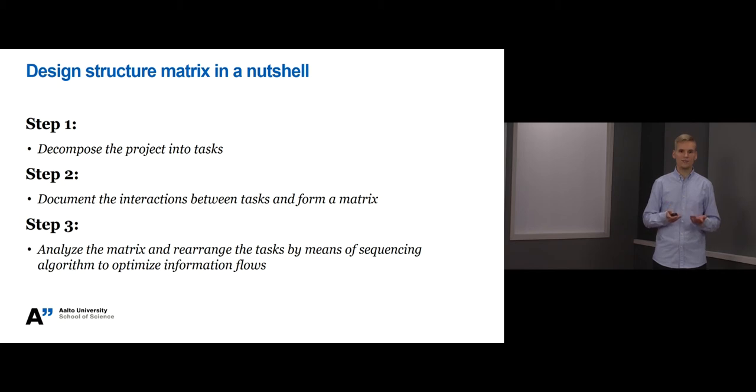Forming a design structure matrix consists of three main steps. First you decompose the project into tasks. Second you document the interactions between tasks and form a matrix. Third you analyze the matrix and rearrange the tasks by means of sequencing algorithm to optimize information flows.